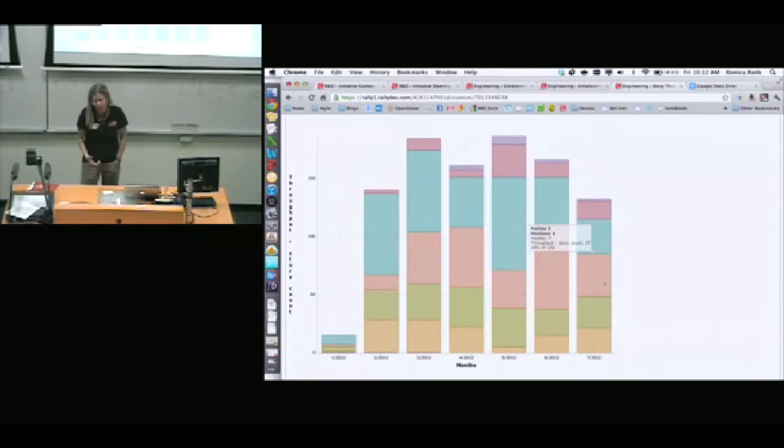The way this steering happens, it happens on a cadence. So going back to your question, this review of our investments, how we are investing, happens quarterly. On a quarterly basis, we look at our allocation, where we are spending our money in terms of R&D, and we adjust that. We steer initiatives monthly. It's a continuous deployment shop, so there's a lot of stuff that gets done in that month. And we steer the enhancements or the features weekly, and that's the product owners looking at what are we actually getting out of the door and what's getting delivered, right?